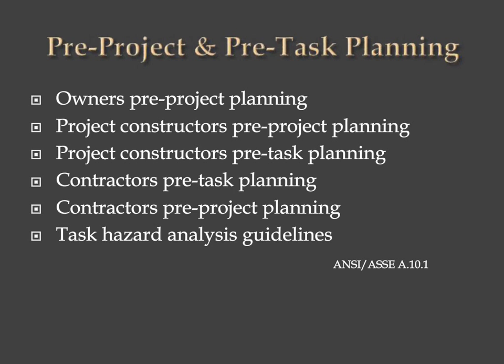So let me just quickly hit that. A project survey is prior to the start of the work. Each contractor shall conduct a physical survey of the job and make a survey of the work to be performed by reviewing the drawings, conducting discussions as applicable with one or more of the following: the owner, the engineer, general contractor, and construction manager.